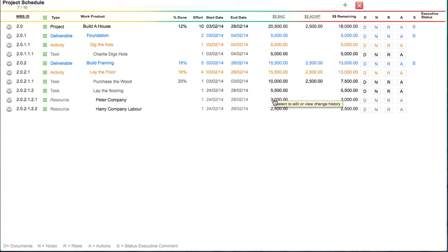And that's how you would make the adjustments if necessary to bring the percentage in line with your expectations. Because if it's 20% complete and it reflects 25%, and you want to bring it to 20%, which is what you think it is, then you adjust your BAC to reflect the new reality. It's either going to cost you more or less, and that would bring that 25% back in line.